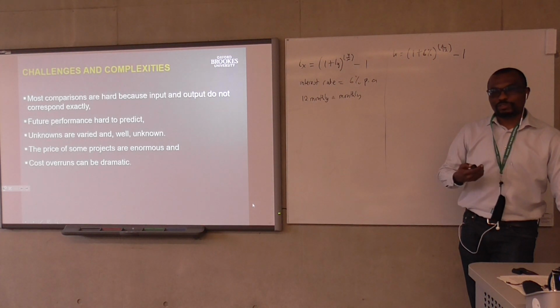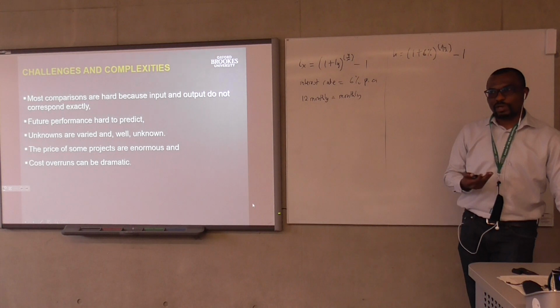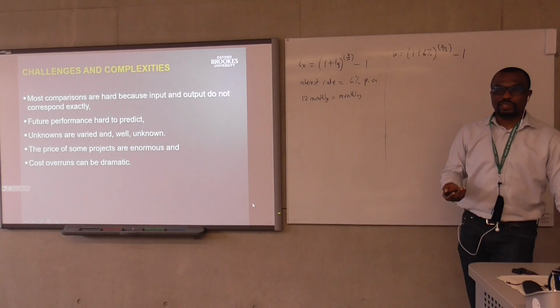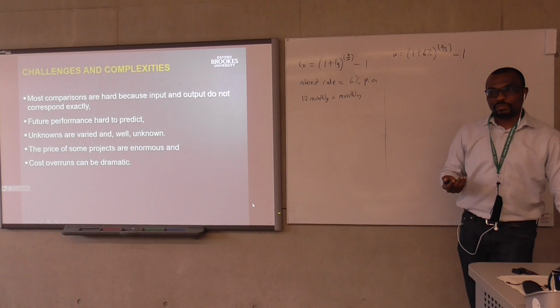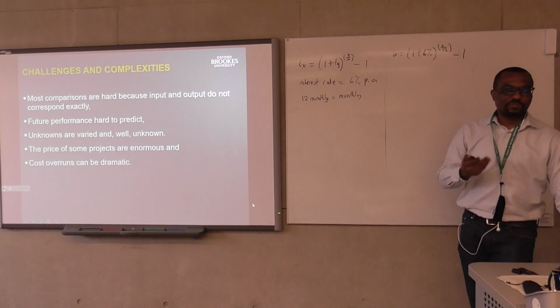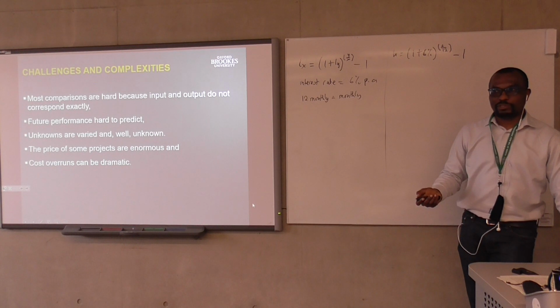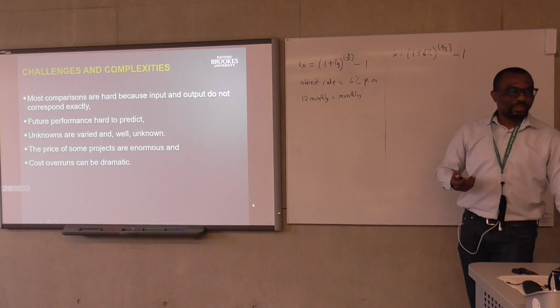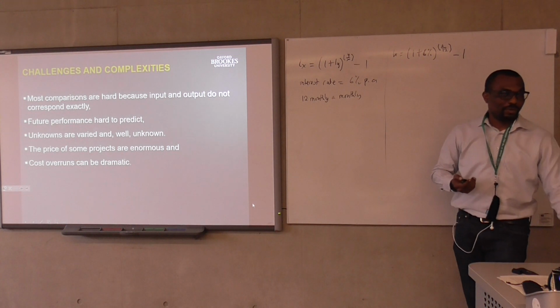For instance, you may make the assumption that you want to go in with a pad foundation. You may have done your initial design, but you get onto site and you realize there's some groundwater on the site, even though the site investigation did not reveal it. And they may have to change from a pad to a raft foundation, right? And then sometimes, as the project is ongoing, there are changes which happen on the project.